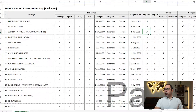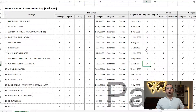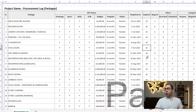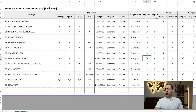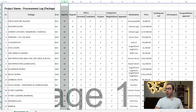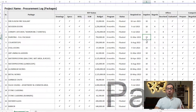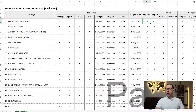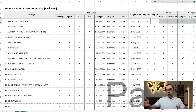We will be floating the RFPs or RFQs — Request for Quotation — which is the same thing, or simply called an inquiry. You float the inquiries and, package-wise, you need to track how many inquiries were sent and how many subcontractors were invited to quote. You can maintain a log like this, and package-wise state the number of inquiries sent — for example, 10 inquiries per package.